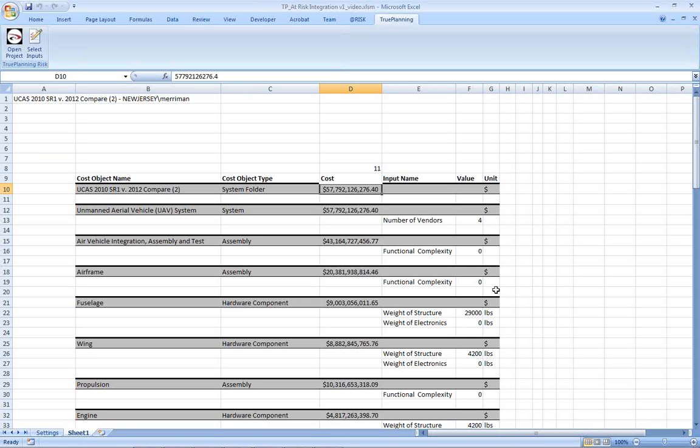What's going to happen then is the calculations will continue, but your minimum values will come back 0. When the COM layer encounters a situation where a project can't run, all the estimated costs for the cost objects come back as 0. So what you'd see in that situation is your mins would all be 0. Whether that run then becomes a good run or not, I don't know. But especially if you're doing 1,000 runs and you're running it overnight, you don't want to come back in the morning and see that this came out 0 for my min, so it kind of throws off your curves. You've got to be aware of that. Be very careful when you're picking your inputs.